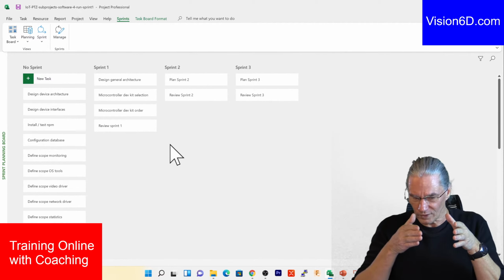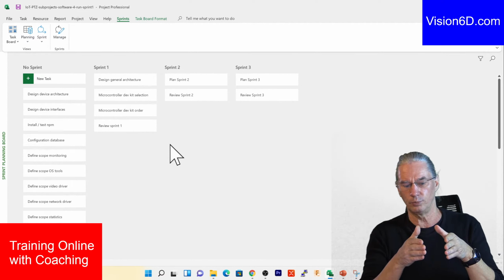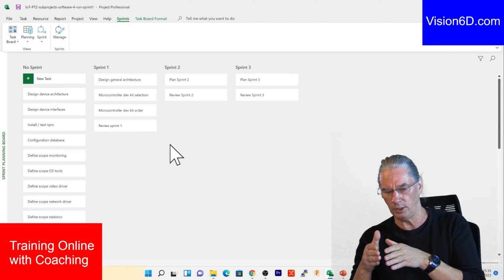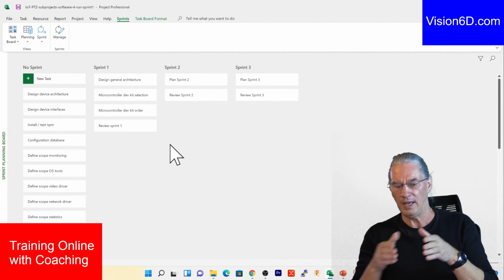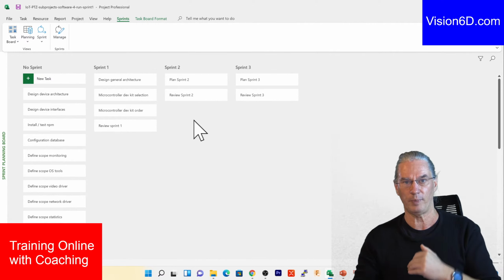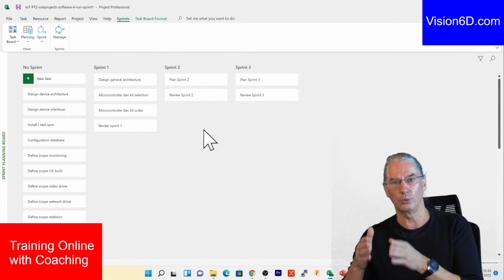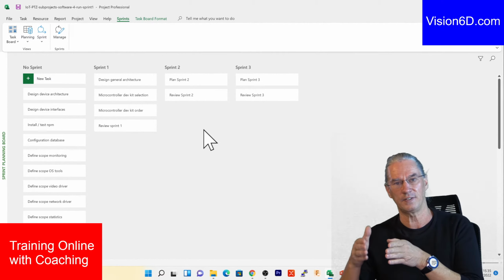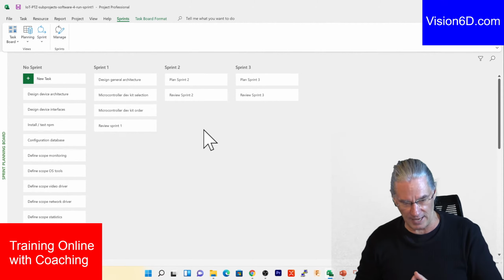So, for that reason, it's not really important to be the most precise in the beginning, because you will perform your estimations, and after a few sprints, during the retrospective, you will improve or change the way you do the estimations for what's coming as next tasks.